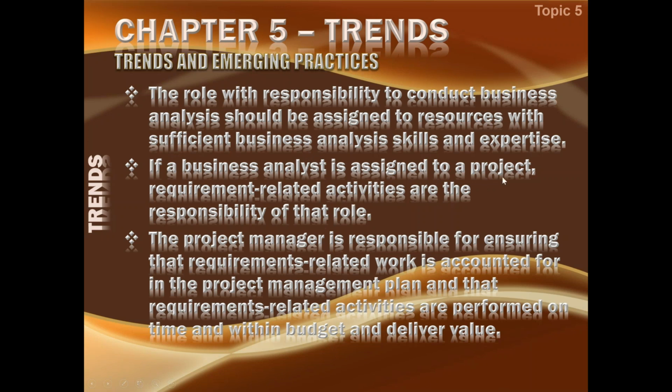If a business analyst is assigned to a project, requirement related activities are the responsibility of that role. If in your project there is a business analyst associated with you from outside, then product related things like product scope and the requirements, you would count them towards the business analyst. The project manager then would be responsible for ensuring that the requirement related work, that is the project scope, is accounted for in the project management plan, and that requirements related activities are performed on time and within budget and deliver value. This much is the responsibility of the project manager in that case.